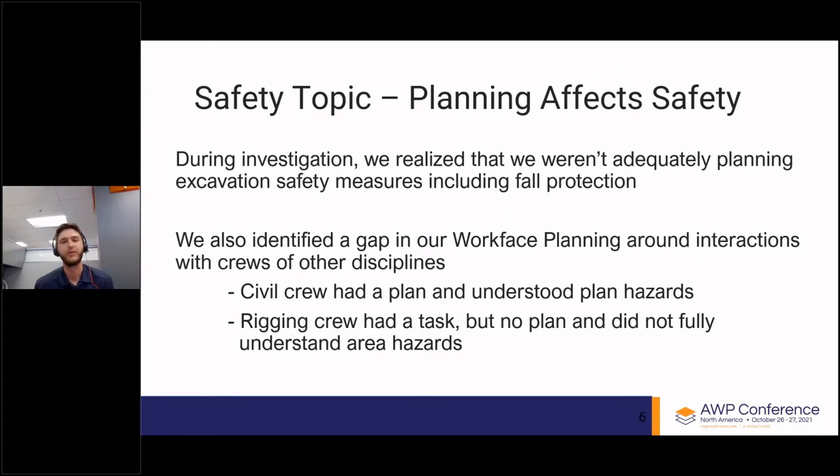During the investigation, we realized that we weren't adequately planning excavation safety measures, including the fall protection aspects of that. But we also identified a gap in our work-face planning around interactions with crews of other disciplines. And the civil crew, they had a plan and they understood the plan hazards associated with it. They had their IWP and they knew what to do. The rigging crew, they just had a task. They didn't have a plan and they didn't fully understand the area hazards associated with it.